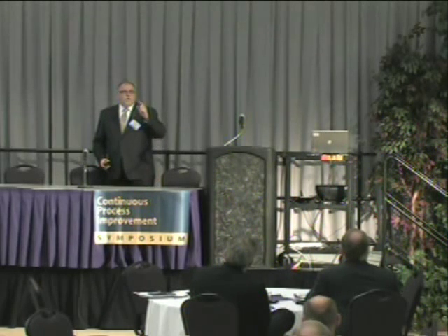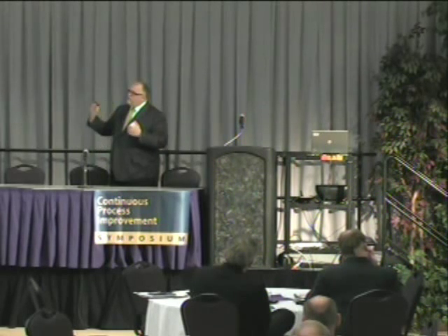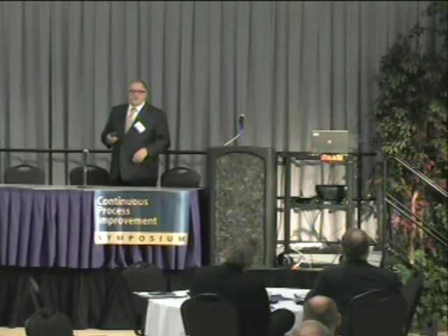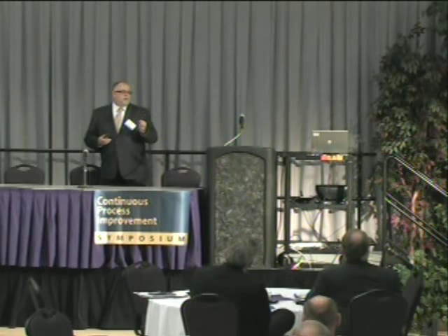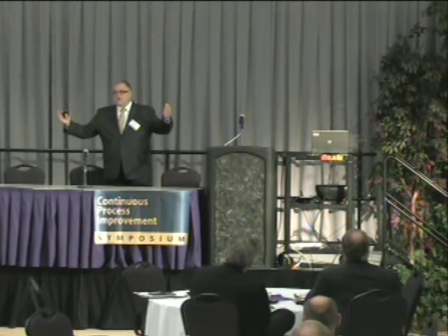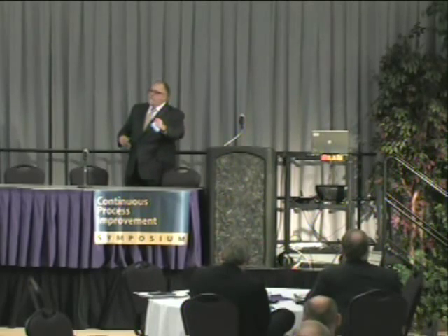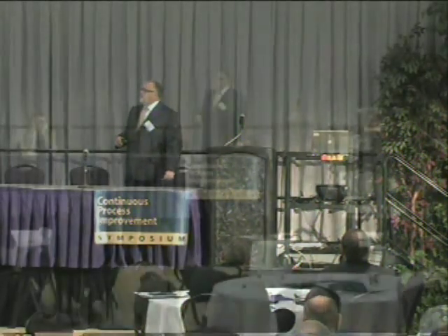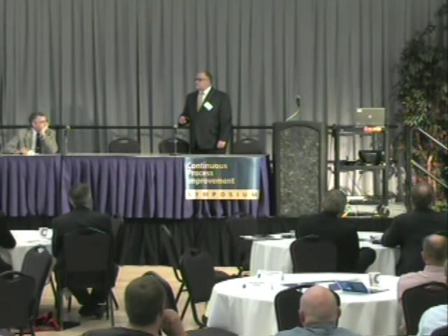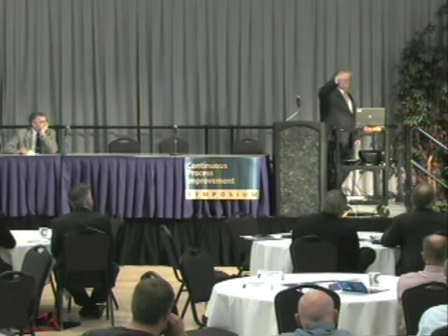The thing is, what we want to do is create a cycle of reinforcement. We want to reinforce our positive results. We can find projects where we can do quick things, simple things. If you've got a 6-month or a 1-year project, it's a big project, it's going to get lost. And then a year from now, people are going to forget who even signed the AFE, the capital request to get that project launched. So, short projects.